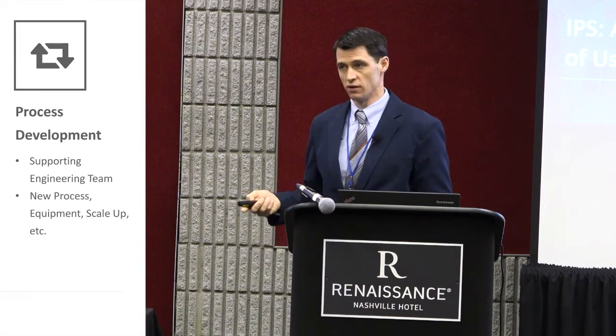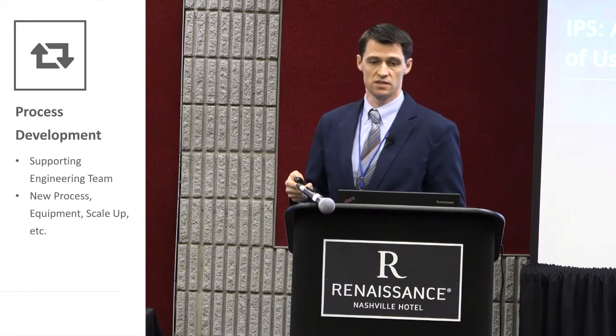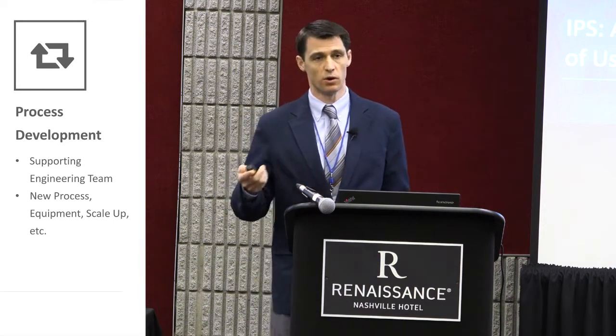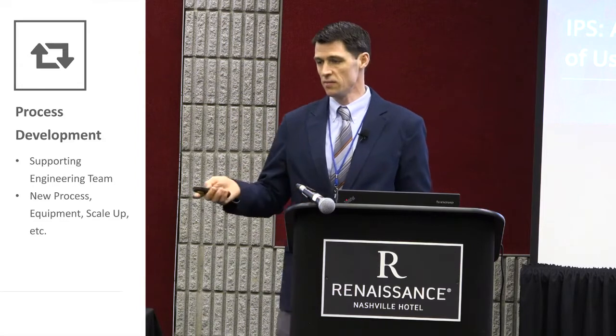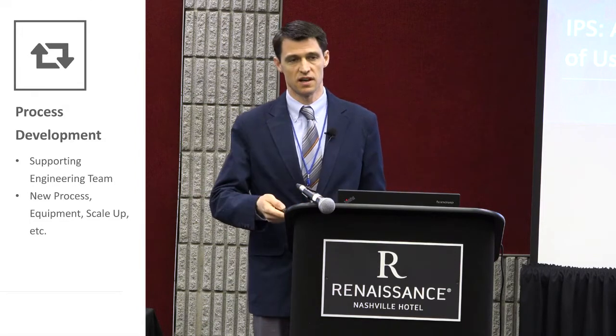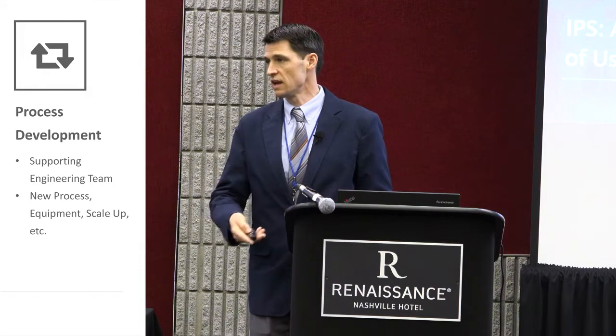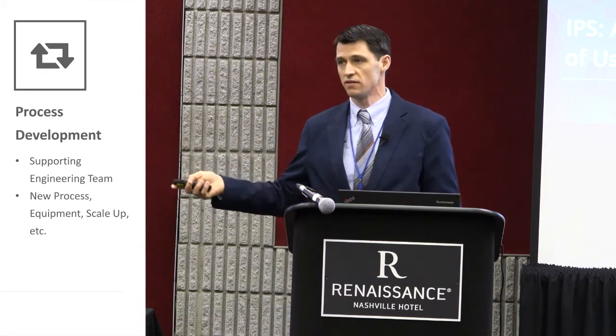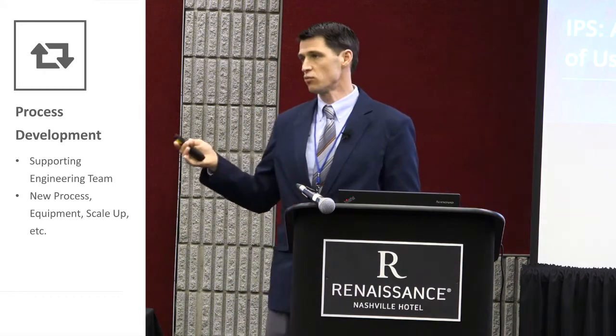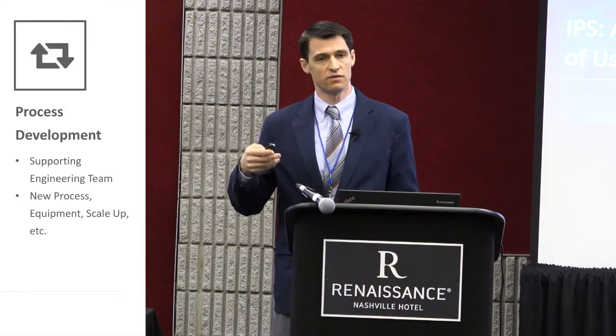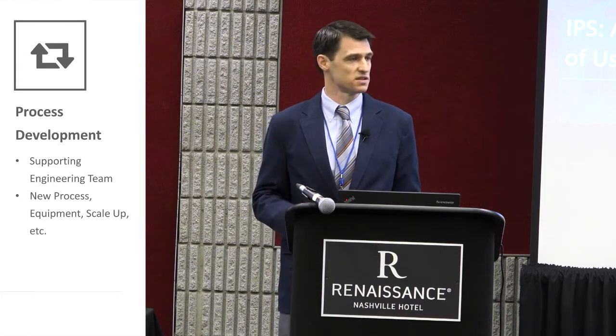And then finally, process development. We mentioned earlier that this has a whole bunch of new components in terms of equipment scale-up. Our initial design, our existing facility has a 1,000-gallon tank. We're going to move up to a 5,000-gallon. It has a different process, has different validation requirements. All those things need to be thought out.